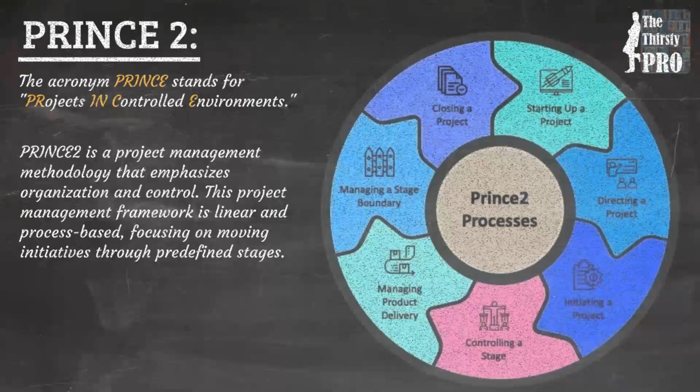The next stage is initiating a project. The project board chooses a project manager to lead and create an even more detailed project plan. This includes the baselines for time, cost, quality, scope, risk, and benefits. The project can officially begin once the project board fully approves the project plan the manager creates.